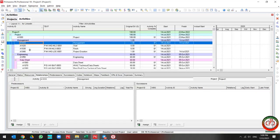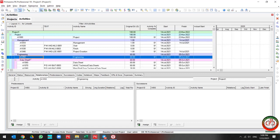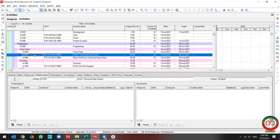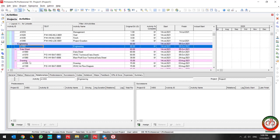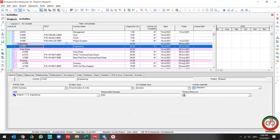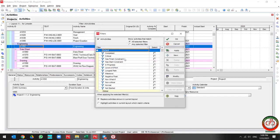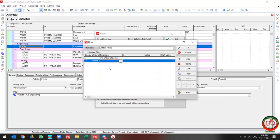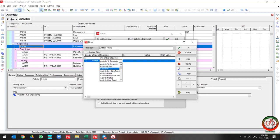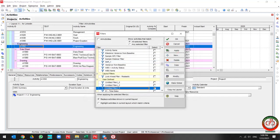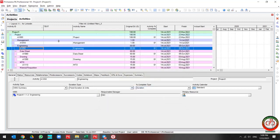I open it and as you see, this file needs to update. But when you use MPX file formatting, you have some extra information like this. These are WBS summary. If you filter all the WBS summary over here and you delete this, you can find activity type is equal to, you can find your pure file over here.